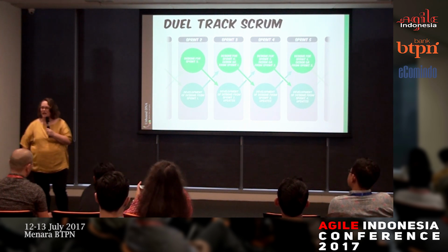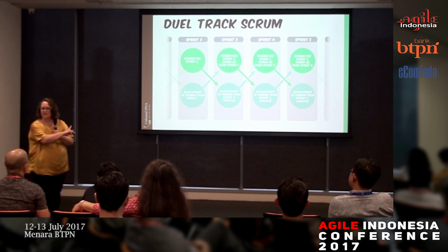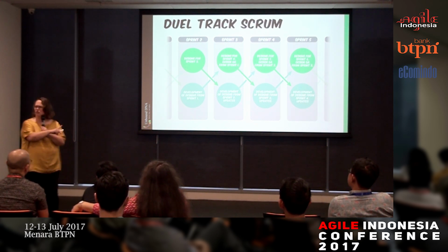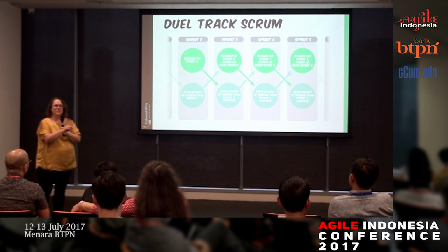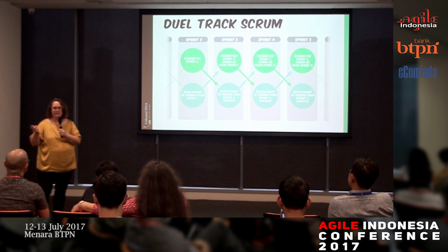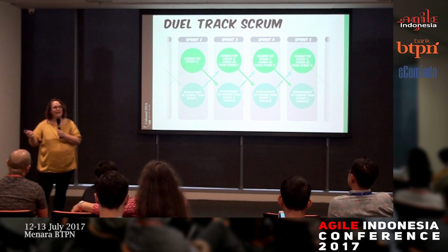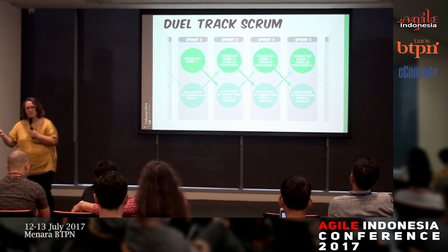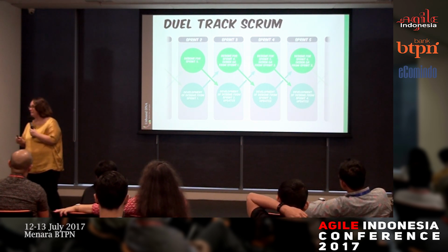And you ask teams, how fast are you? Oh, we're great. We're delivering in a sprint. And I look at this and I go, actually, you're developing in 3 sprints. This is your cycle time, 3 sprints. It's this misnomer that we're awesome. And what I'd actually say is, don't have 3 sprints. If it's going to be 6 weeks, make your sprint length 6 weeks. Do it end to end in whatever time it is. So this misnomer that all sprints have to be 2 weeks or less, I actually think maybe we should be extending them more.